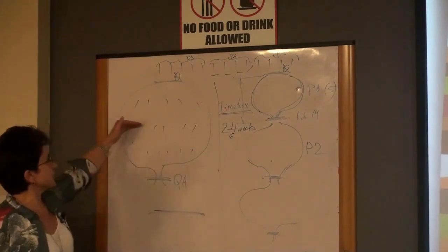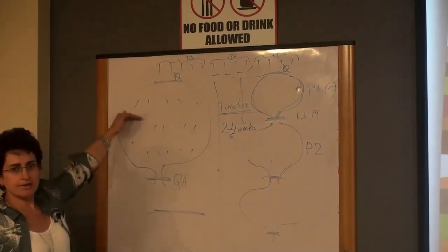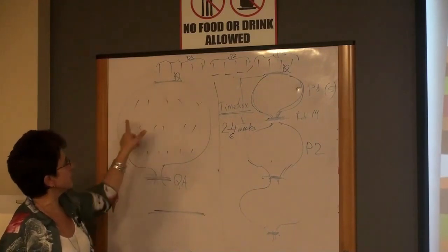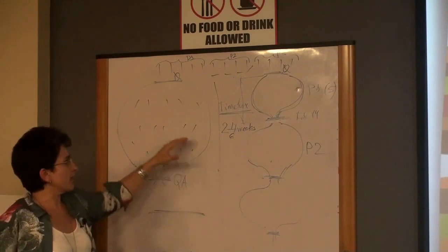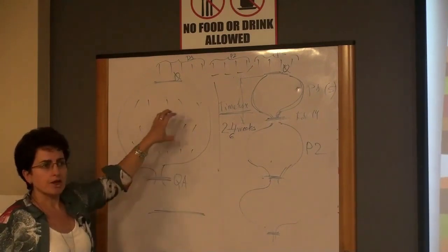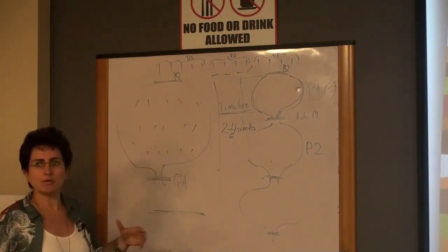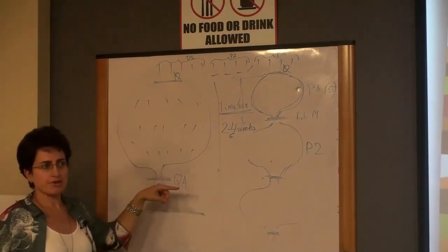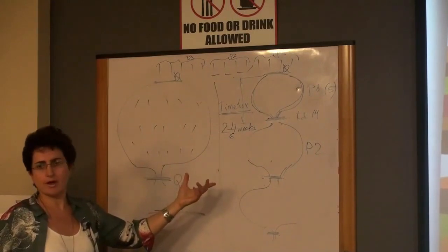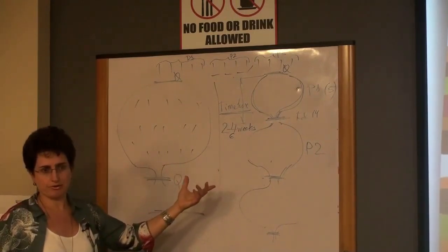If the market changes here, you cannot do anything because your features are interdependent and they're all being developed in parallel. So even if the market changes with this model, you cannot quickly react. So you will still release the product with this set of features. But chances are, by the time you release your product, your market is gone. You can miss the market opportunity.